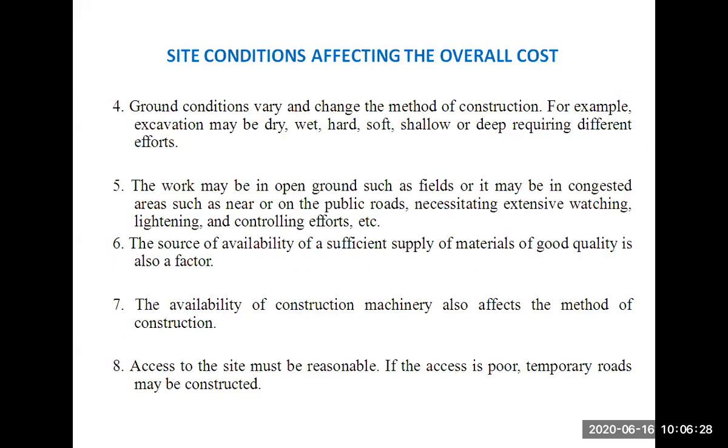Then ground condition, as we have discussed yesterday, that is whether we are having black cotton soil, or a hard murum, soft soil, wet soil, or coarse sand, cohesive or non-cohesive soil. So again, depending upon the soil conditions, that is ground condition, our estimate will definitely vary, and it will affect the overall cost of the project.